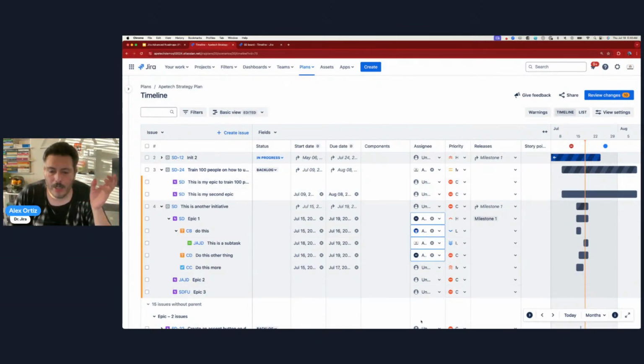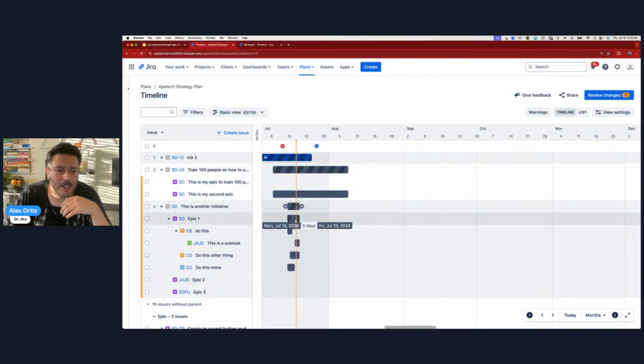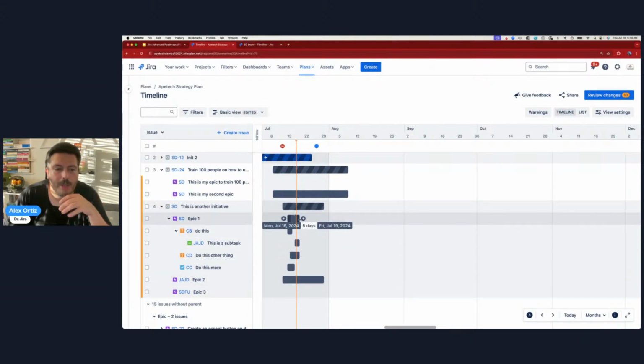Now, the piece de resistance, as they say, on the timeline: once you have this, you can link this epic. I can say this epic is dependent on this other epic. Unfortunately, to do that, I have to give a date to the epic, which I now did. But now I can grab this epic and link this together.